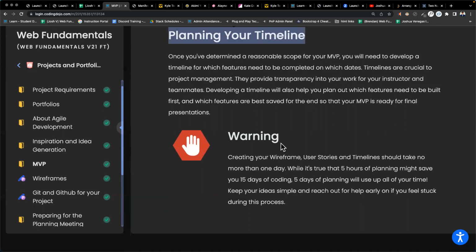If I don't get it by tomorrow afternoon, then I will move on to this next bug feature and try to complete this at least, if that's an option. So you want to say every day how well you have met your goals, your timeline goals for that day, what you plan to do to fix it if you haven't met it, and show the work that you have completed if you have met it.